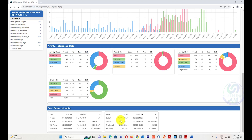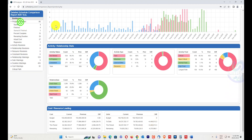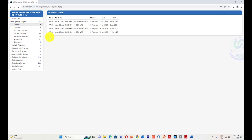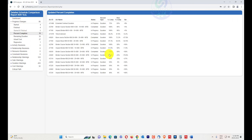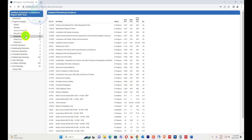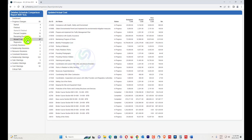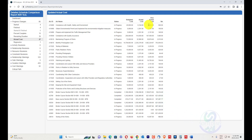Progress changes show which activities have started and which have finished between the two schedule updates. Percent complete changes between previous and current are listed, including variances. Remaining duration changes between the two updates are also shown. Actual cost changes are shown as well — for example, if the previous actual cost was 8,604 and the current is 9,164, there is a variance of 560 during this update.